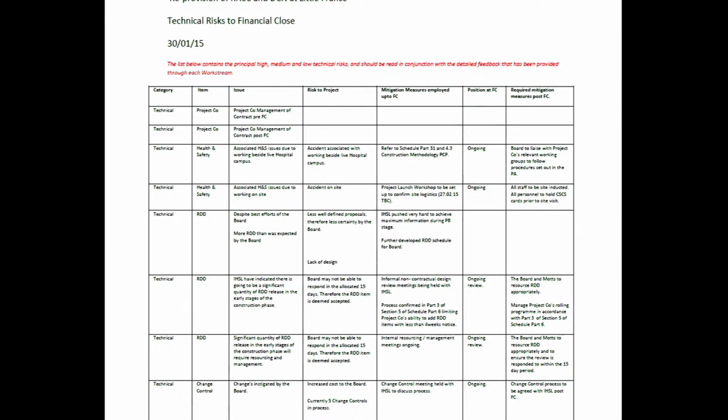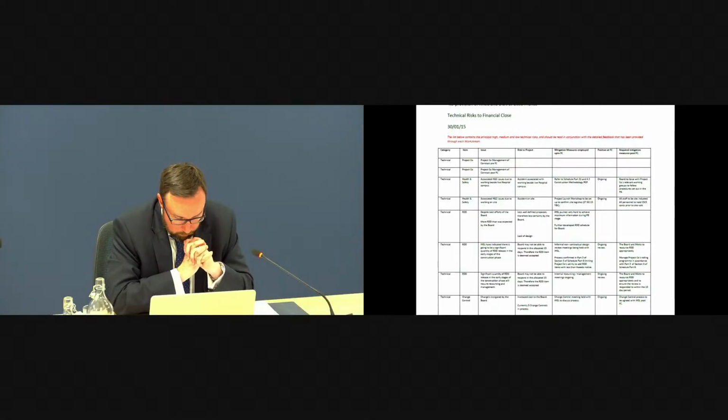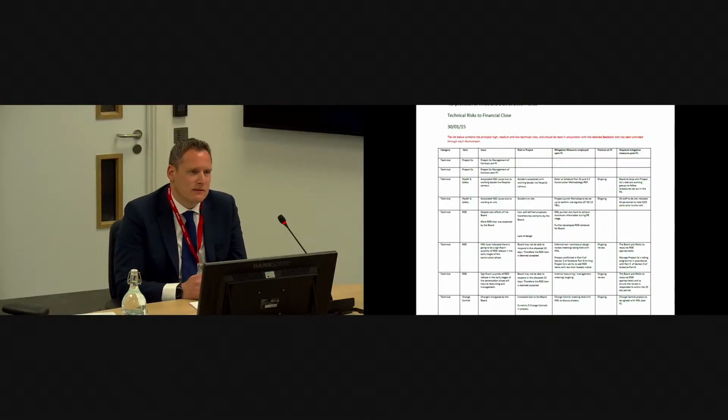Yeah, there were extra clauses added to the RDD beyond, say, typically you just have a list of items to be submitted, but there were four parts added to it, and one of the extra obligations we put on was that we were looking for a 15-day rolling programme, so that we were aware of what information was coming in, and therefore the team could be set up to try and review that data in the construction phase. Thank you. I'm finished with that document, and we can put that to one side.